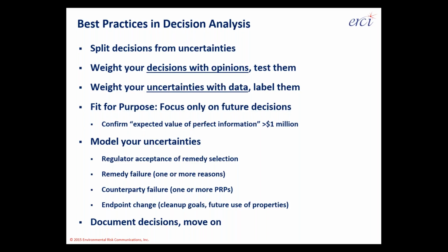Finally, it's important to model your uncertainties. We'll go into the next few slides about how to do that modeling because, again, it's a responsible and accurate way of characterizing what the financial risk to an enterprise looks like. And those are things like, will a regulator like my remedy? That's one blind spot that we find time and again in our work, left out of a good decision analysis. Will the remedy fail?